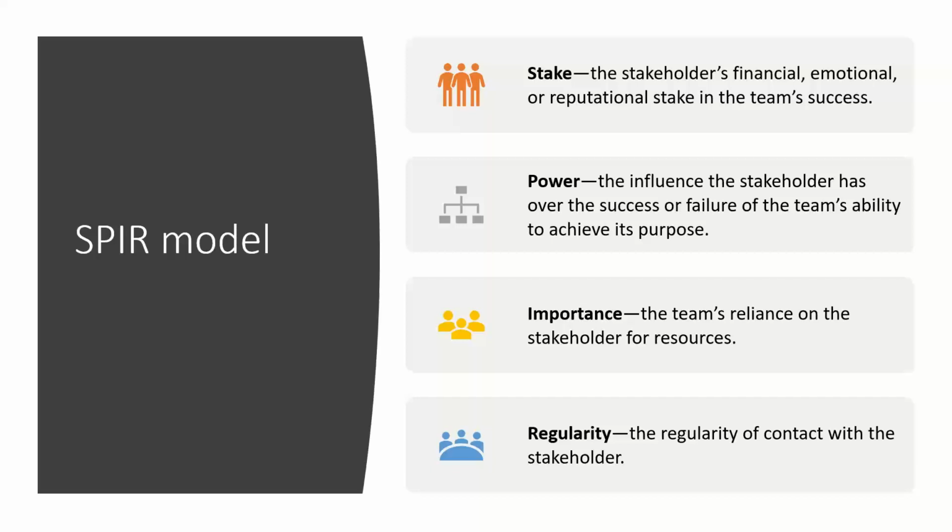And once you've identified your top 5 stakeholders, the conversation with your team then is around what we can do to strengthen our association or connection with these top 5 stakeholders. And you brainstorm this with the team so that the team are engaged in the process and it's not just left to you. Because the bottom line is, as a team leader, you're not the only one that is responsible for stakeholder management. You're trying to create a very clear perception in your team that it's everyone in the team that is responsible for stakeholder management.